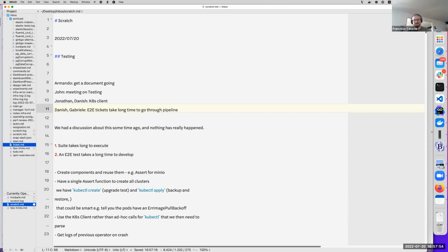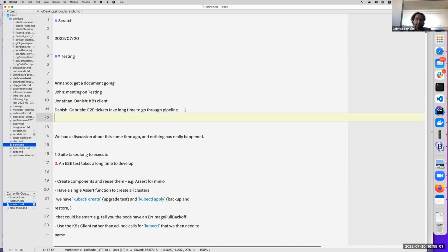That's not just stopping end-to-end tickets, it's stopping tickets. Because even the features, if they have no end-to-end, what's the point of writing? I think the more general way to say this is if there are enough tickets on the board, let's not put some more on it. Let's finish what is on the board. More generally, is there any reason to not just work right to left on tickets? Correct. That's the lean approach.